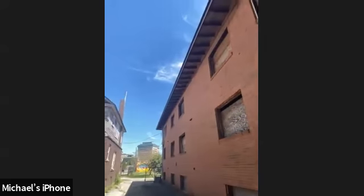How do the eaves on the building look? Are they okay, or are they kind of a mess? They're in various shape, but pretty good shape. There are some areas that need work. You'll have new 2x6s that go on there. New roof. So you're stripping off the whole roof, the roof sheeting and everything too? Yes, we're ripping off the roof and replacing the bad sheeting. Okay.